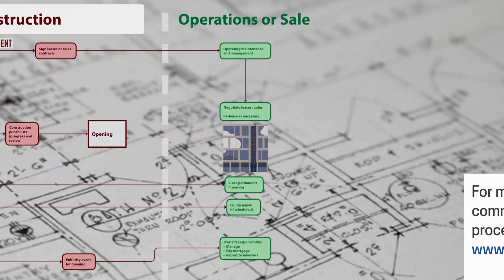Following construction completion, most projects move on to an interim phase of lease-up and stabilization, meaning there are relatively certain operating expenses and income. The day the contractor turns over the building, it's ready for occupancy, but not yet occupied. Financially, this means there's little to no revenue coming in from tenants, but operating expenses are already going out. If the building was pre-leased, then this period may be short, but in many cases, even with key pre-leases in place, there may be spaces that still need to be marketed in order to reach a point of stabilized operations.